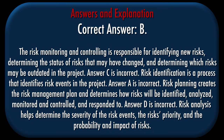Correct answer: B. Explanation: Risk monitoring and controlling is responsible for identifying new risks, determining the status of risks that may have changed, and determining which risks may be outdated in the project. Answer C is incorrect — risk identification is a process that identifies risk events in the project. Answer A is incorrect — risk planning creates the risk management plan and determines how risks will be identified, analyzed, monitored and controlled, and responded to. Answer D is incorrect — risk analysis helps determine the severity of the risk events, the risk's priority, and the probability and impact of risks.